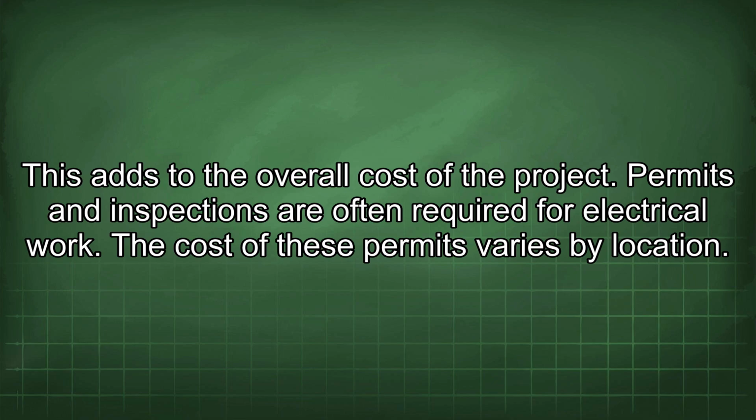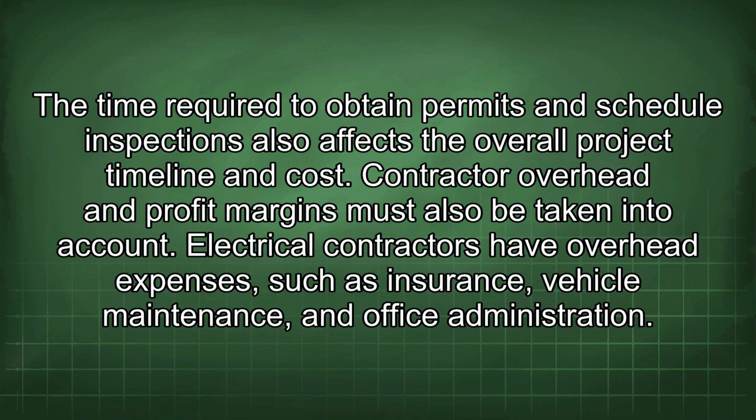Permits and inspections are often required for electrical work. The cost of these permits varies by location. The time required to obtain permits and schedule inspections also affects the overall project timeline and cost.